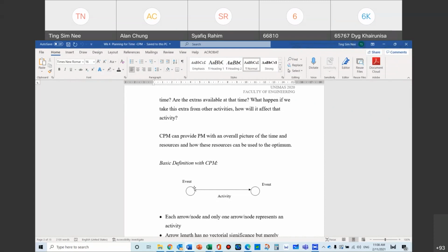And then our arrow is just basically something finishes and then something will go to the next thing. So that is an indication of the relationship. But the picture that you are seeing here on the screen is actually activity on the arrow. You see, activity is here. It means activity, construction of the piles, piling work. So then the event is, my piling work finished. The next work will start next. You see? So that is what we mean by network.